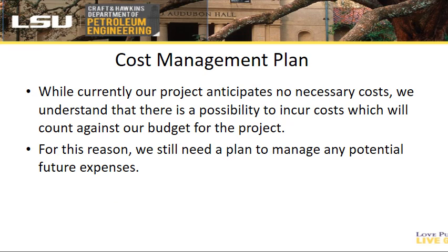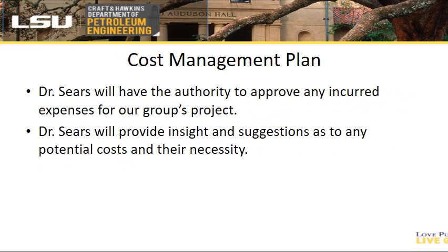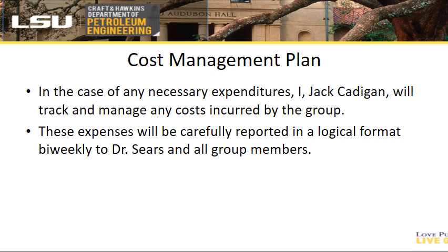Currently, our project anticipates no necessary costs, but we understand there's always a possibility to incur costs. Dr. Sears has the authority to approve any incurred expenses for the project, and he will provide insight and suggestions as to the necessity of any potential costs. If there are any necessary expenditures, I will track and manage those costs, and those will be reported bi-weekly to Dr. Sears.